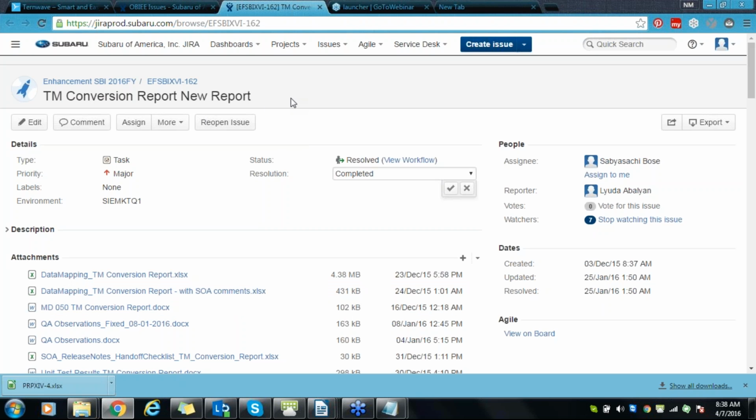So when you do the retrospection or the analysis after the release of this project or product, you will say, hey, when I did my test plan, I said that I need only 10 days of testing. But the actual effort was almost 1.5 months. So when you do the introspection or the root cause analysis, you will say that I didn't do the test planning correctly. So next time, if the same type of requirement comes, I should increase the number of days for testing. All this will come with more experience.